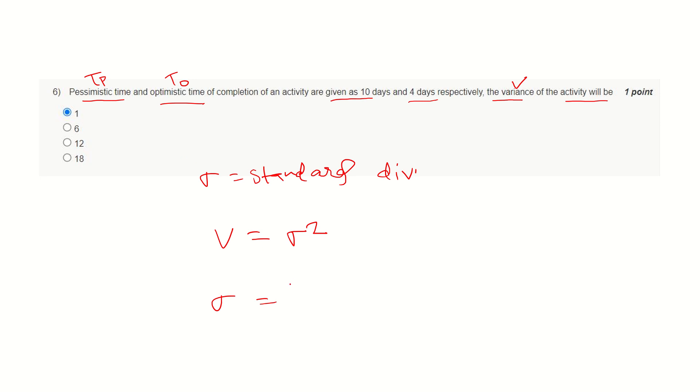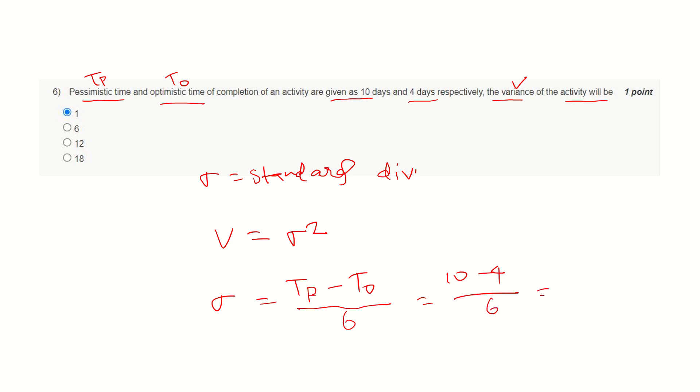The relationship between sigma, TP, and TO is sigma equals TP minus TO (pessimistic time minus optimistic time) divided by 6. This will make it 10 minus 4 divided by 6 equals 6 divided by 6, that is 1. Here we got the value of sigma as 1, and hence variance is 1. This is the correct answer.